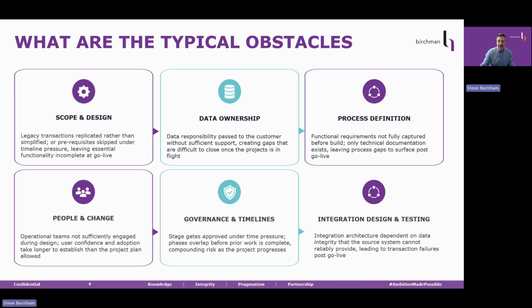So next we come to data ownership, the handoff that really nobody agreed to. Poor data is the single greatest technical risk in any public ERP cloud migration. Legacy environments contain decades of duplicated, incomplete, or obsolete records. When moved onto an in-memory platform, these issues surface immediately.